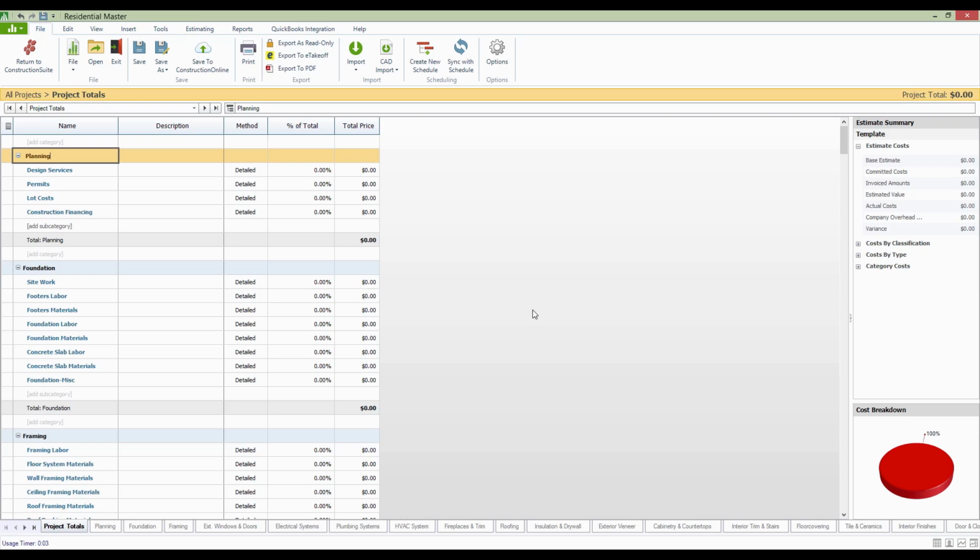Now, a lot of our clients, when they're first getting started, will take a look at this as it correlates to QuickBooks and recognize that there is an option or a possibility to go ahead and set up most of your cost codes in these estimate templates. And the easiest first step to that is to actually come into your category names and just start to put in maybe a little brief numbering system for your categories to match either what's already available in QuickBooks or to create your numbering system so that you can more easily identify things as you're going through QuickBooks.